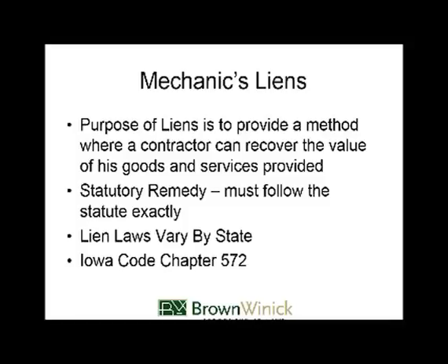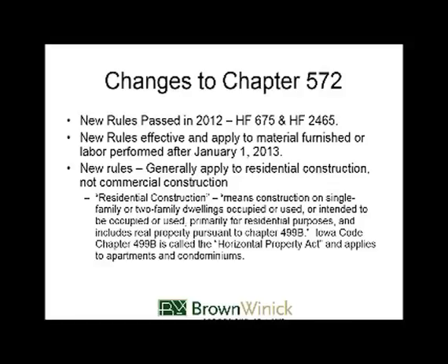In Iowa, you will find the mechanics lien rules in Iowa Code Chapter 572. But one other thing you might want to check, as a part of these new statutes, is that the Secretary of State's office serves as the administrator, and the administrator has the ability to make their own rules. So one other place you might want to look is the Iowa Administrative Code, under 721, Chapter 45. There are some rules that deal with this database specifically there, so I would have you take a look at that as well.